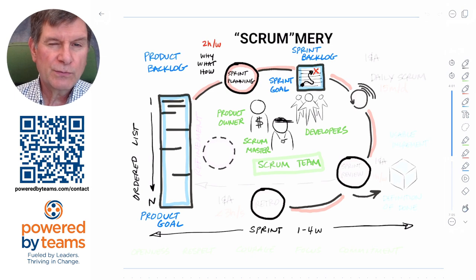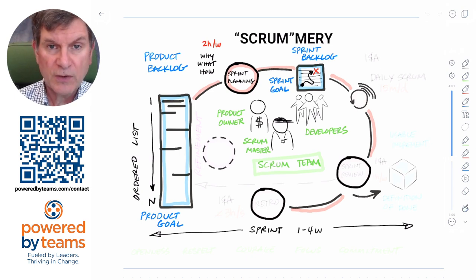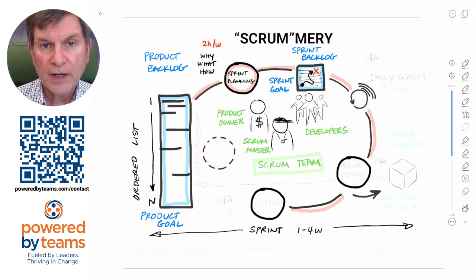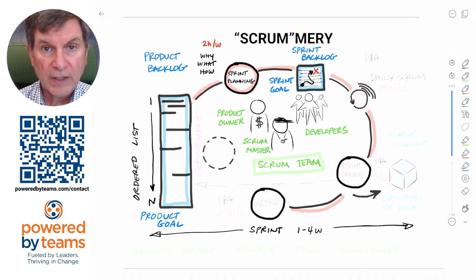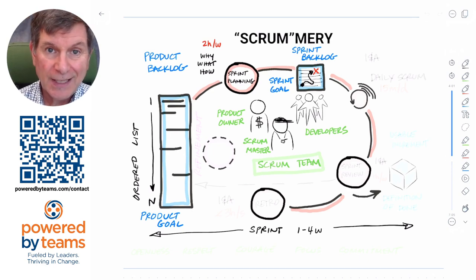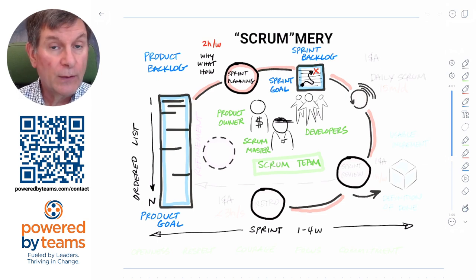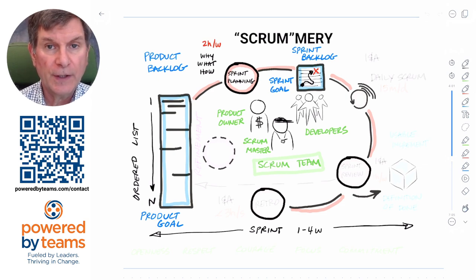Scrum is protected both in terms of these time boxes and also in terms of scope. The product owner owns the product backlog, but the developers own the sprint backlog. Once the sprint starts, nobody can force new work into a sprint without the developers' permission — it's got to at least be a negotiation. A common conversation is: 'What are you willing to give up to get it?'